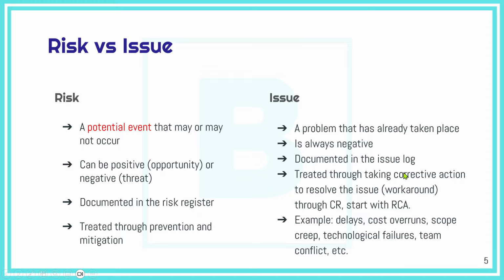We also explained that we don't consider an event a risk related to the project unless it has a triggering condition. So we don't just go ahead and start documenting everything as a risk. And we explained how preventive actions are proactive measures in order to prevent the threat from happening, and corrective action is a reactive measure.